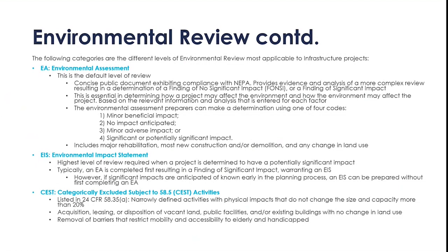This is a highly detailed level of review and evaluation that's required when your assessment results in a finding of significant impact. These are projects that anticipate major changes to the environment. The next two describe defined actions when there's a minimal or no physical impact to the environment. They include the categorically excluded subject to Part 58.5, which includes narrowly defined activities where the project will not create more than a 20% change in size or capacity.